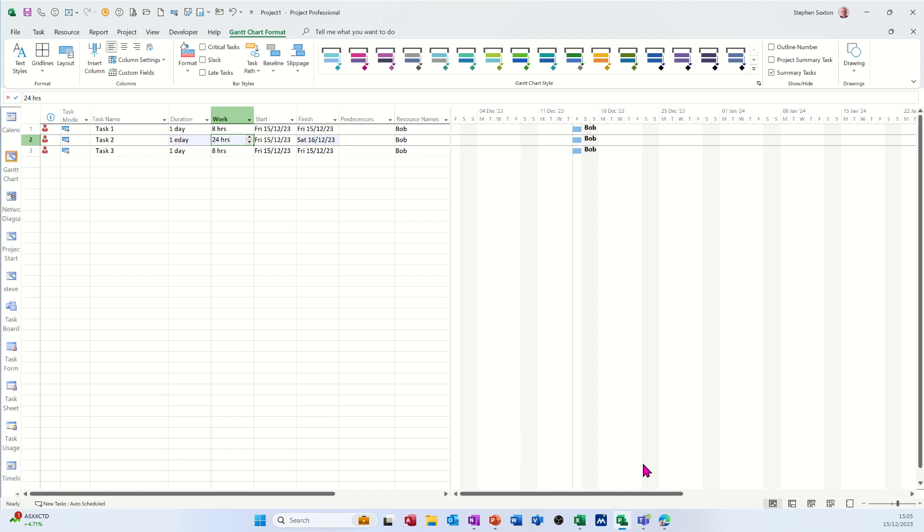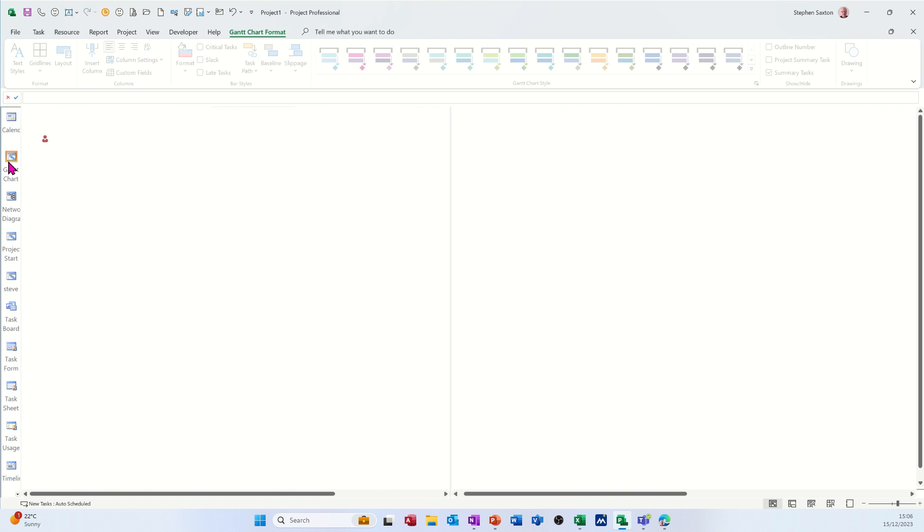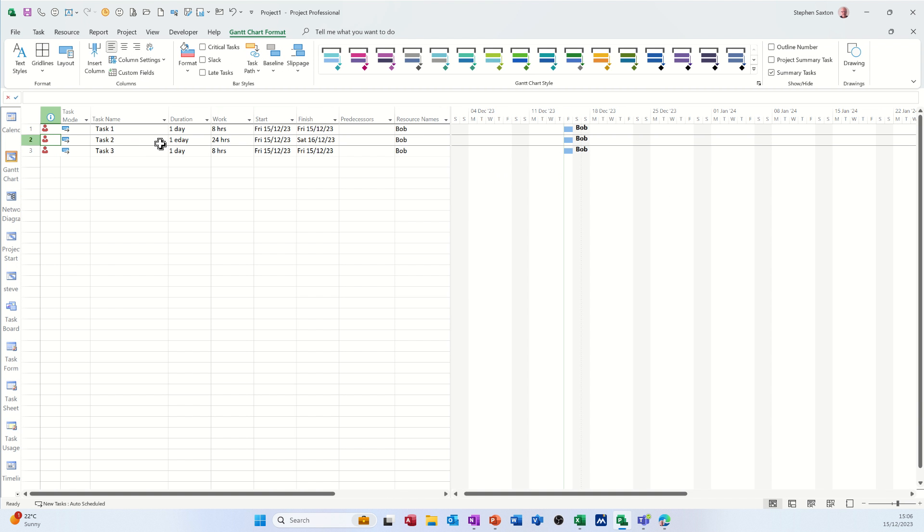Now if I go into task usage, you can see what's happening there. He's doing 16 hours today and eight hours tomorrow, 24 hours, because it's nearly four o'clock at the moment. So why has that happened? Now if I click back to the Gantt chart and just let's change these durations.